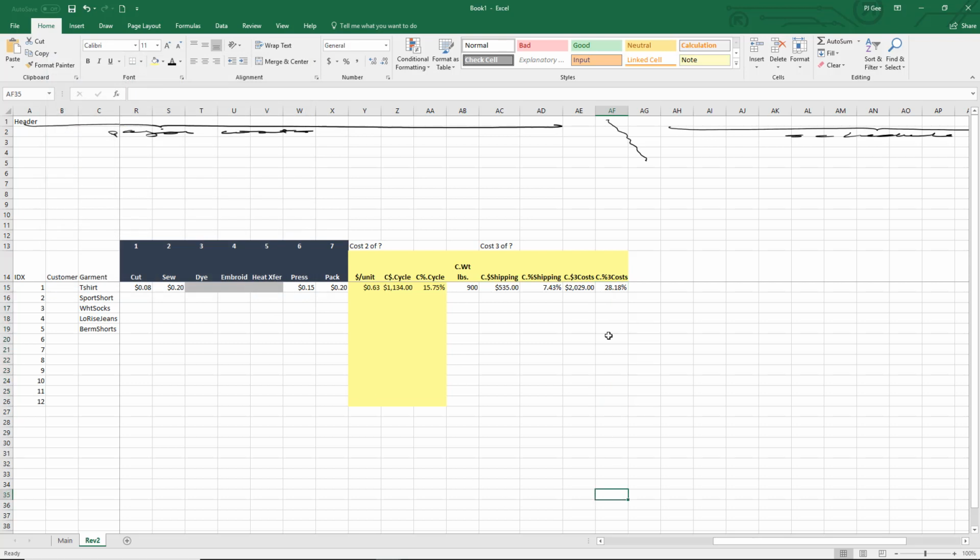What does that tell us? That tells us that the costs eat away 28%. Just these 3 costs eat away 28% of the contract value. And those are directly attributable to the product. So that would be under cost of goods sold, as would be labor, if you wanted to really calculate your gross profit, which is your contract value or revenue minus the costs that go directly into the product.